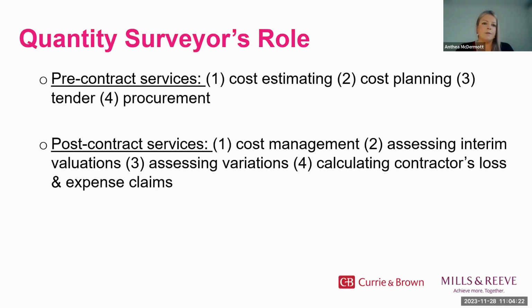Sure. So a quantity surveyor manages all of the costs of a construction project. During pre-construction, we estimate what these costs will be, and at post-contract stage, we manage the expenditure of those costs. Clients are always seeking cost certainty, so during construction, we advise on forecast spend, the cost of variations, and the risk profile of the project. We also attend site, typically on a monthly basis, to carry out valuations in order to assess the value of works complete.